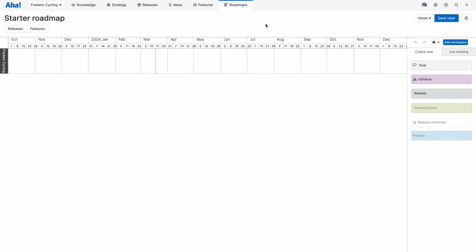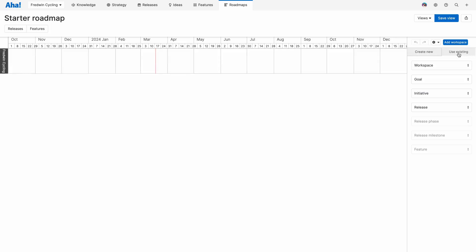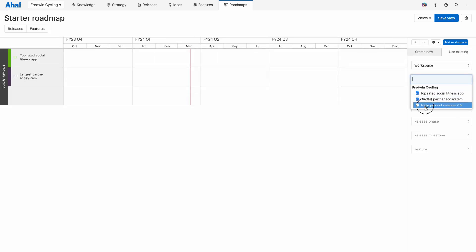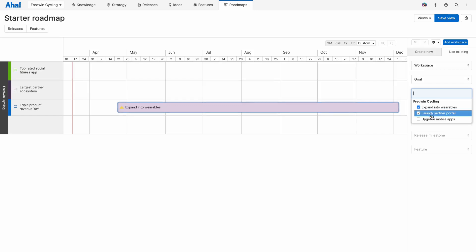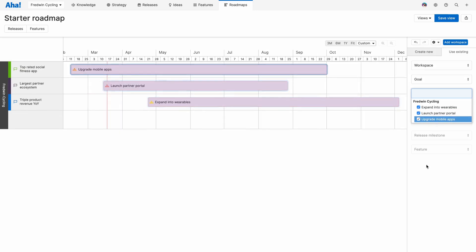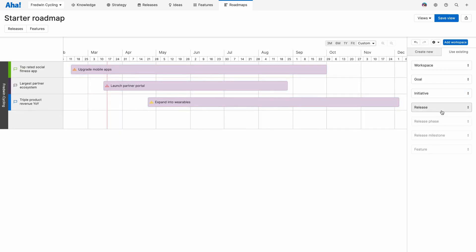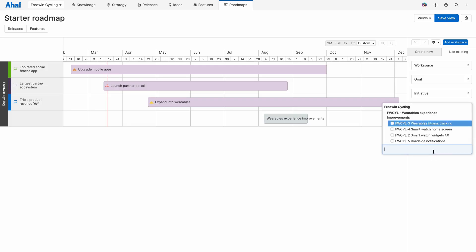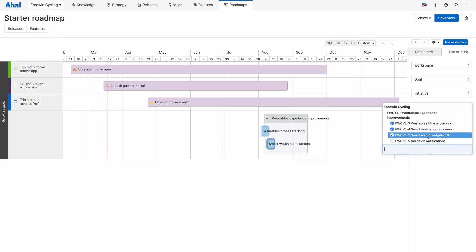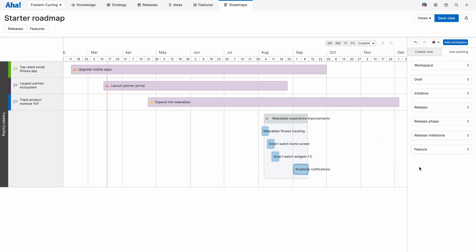I'm going to show you the starter roadmap first so you can see how easy it is to build a roadmap with all of the data that you've already entered. So let's select use existing and select all of our goals. Then we'll do the same for initiatives. To keep it simple, we're just going to work with that new release that we just created together. And then we'll add all of the features within it. In a matter of seconds, you can see how I built a visual roadmap.